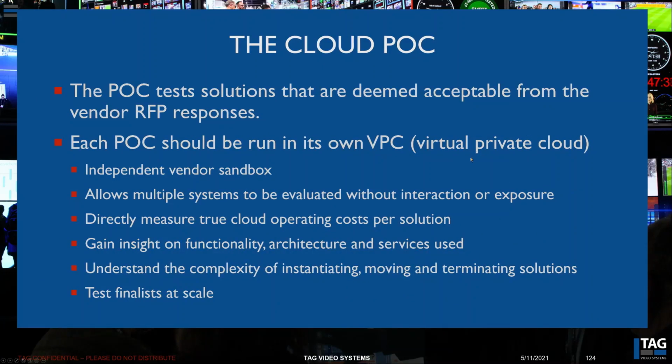I would say the new way is the POC is used to test a range of solutions that are deemed acceptable from the RFP responses. So basically, you take all those RFP responses and you pick the top end of those and you say, we'd like to invite you to do POCs. And the vendor will then stand up their system in a VPC running under your account.